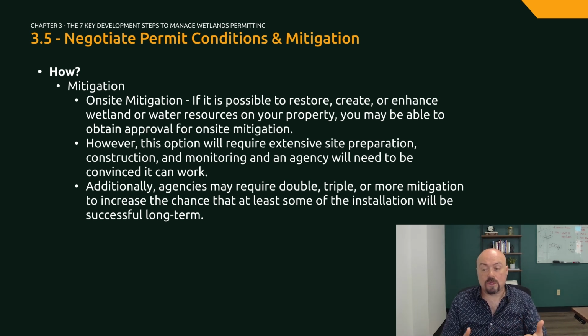However, this option will require extensive site preparation, construction, and monitoring, and an agency will need to be convinced it can work. Additionally, agencies may require double, triple, or more mitigation to increase the chance that there at least will be some of that installation that is successful long term.